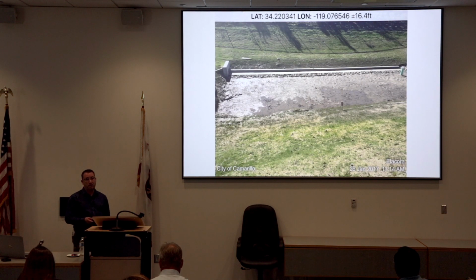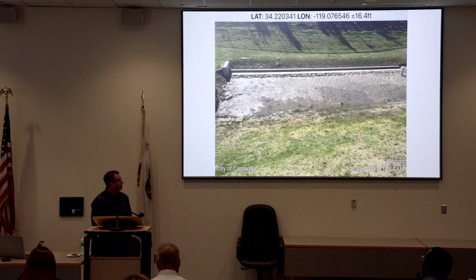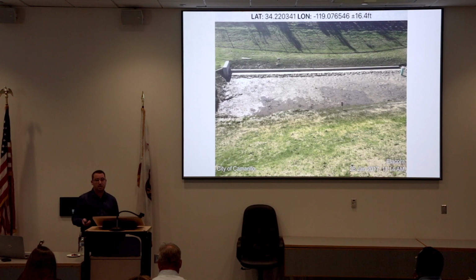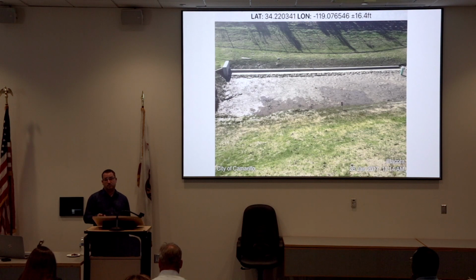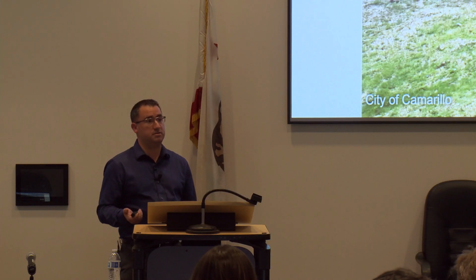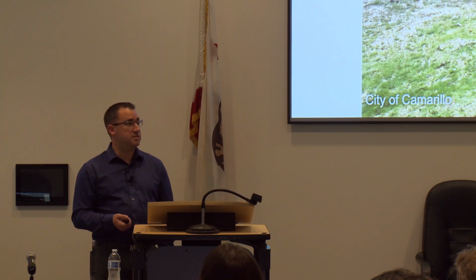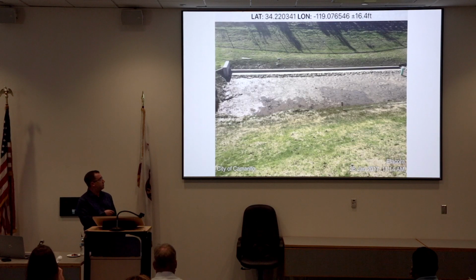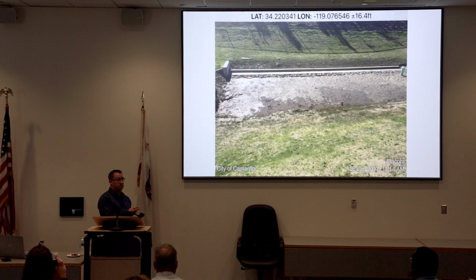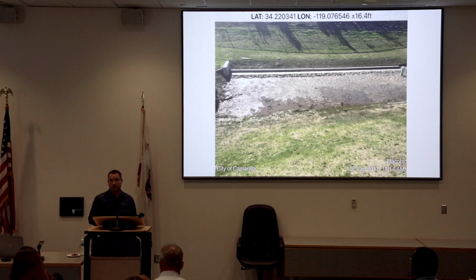So they had to rip out a lot of the sand. They had to redo a lot of that. And of course they didn't like it, but they were trying to get occupancy to some of their facilities, and these are on the plans as treatment devices. So this area was being used to treat some of the areas that they were trying to get occupancy for.